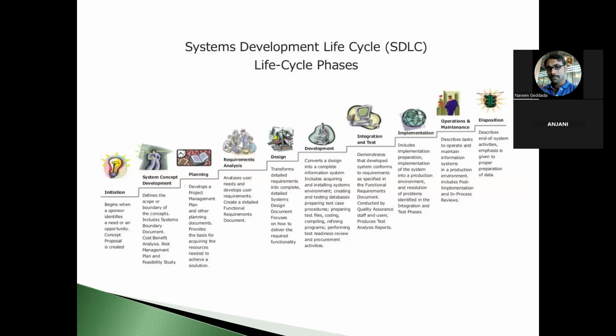And this information, this minutes of meeting, you need to share across all the teams, including the dev tech leads, the project manager, and the solution architect, and from the QA team, the test lead, the QA manager, and the team members. Also include one of the team members from the maintenance or implementation team, who are going to deploy the project in production or on the servers.